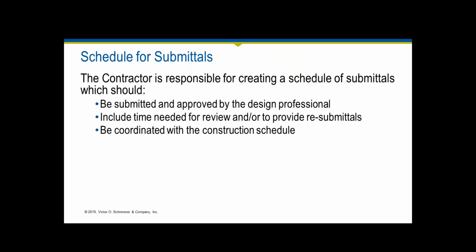However the case may be, that needs to be properly planned for, and of course, it also needs to be coordinated with the construction schedule so that all parties know what is expected, and the time for review is baked into the expected length of the construction time.